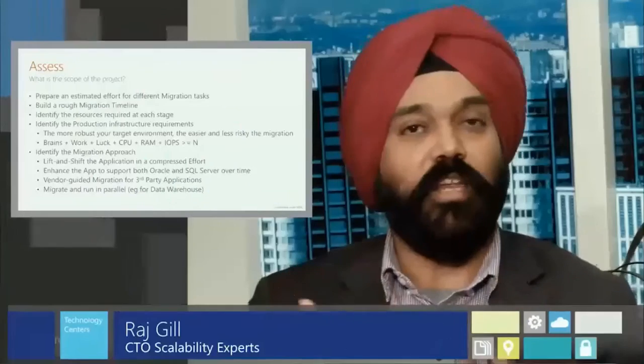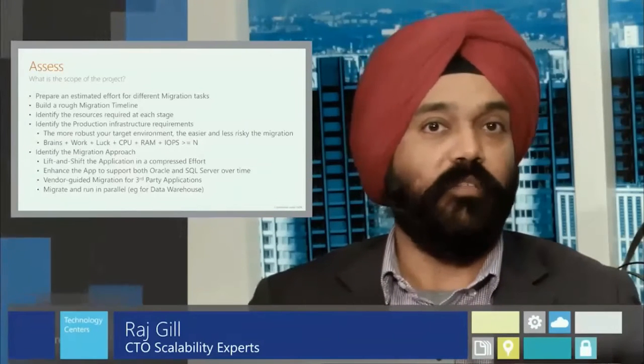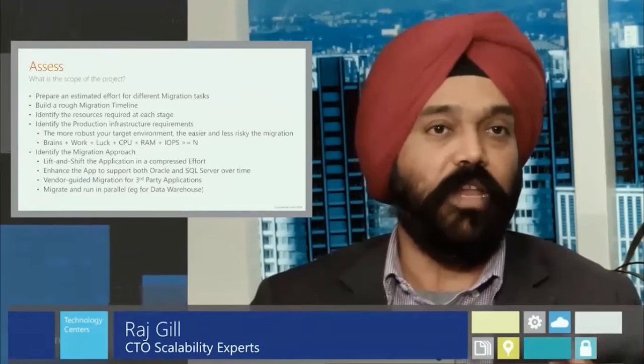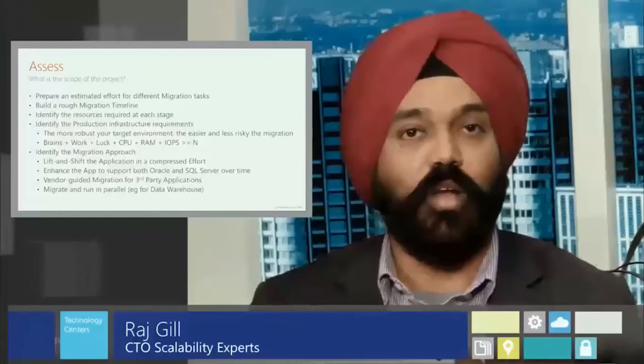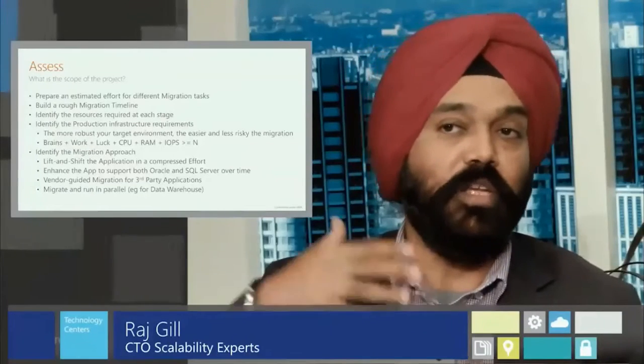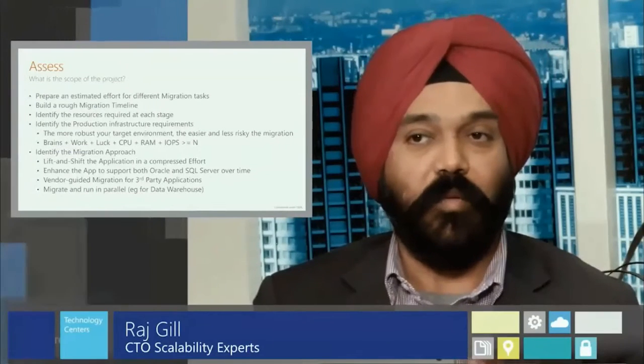So when you stack rank these applications and databases, you can actually know, okay, what is the low-hanging fruit? What's the easy to migrate? And that's the best place to start, because as you start migrating and getting more experience, your team gets more empowered. You have better scripts and tools to work with, and you're better prepared to deal with more complex applications that might be available.